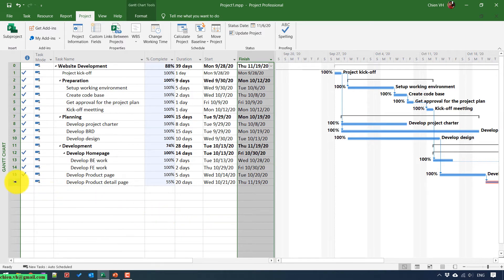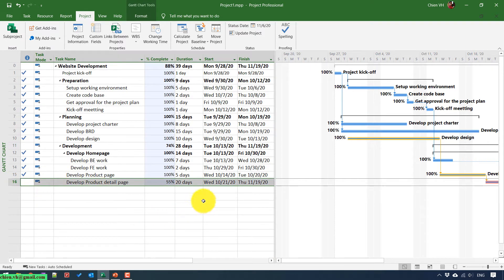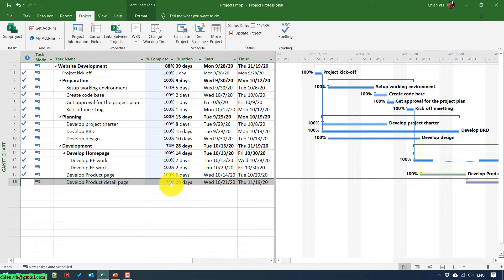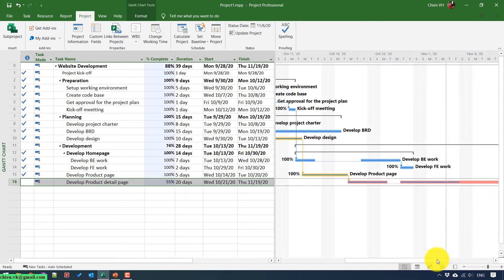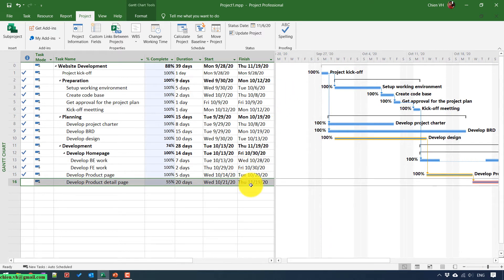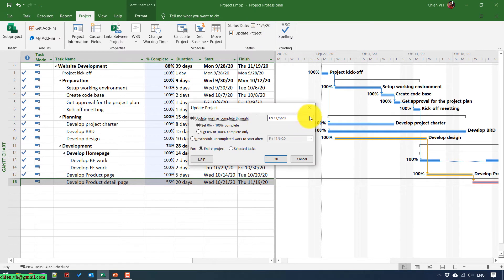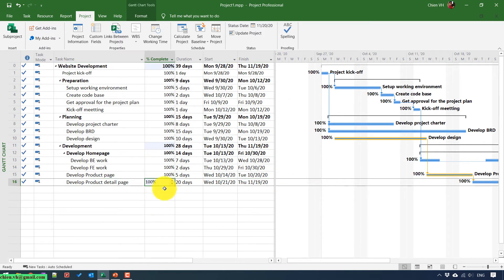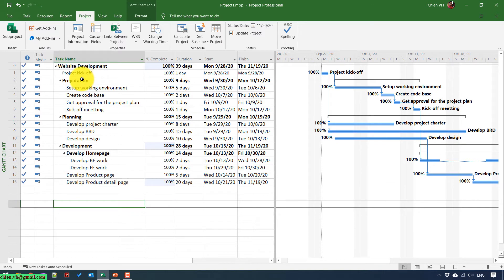For the last task, you can see it has a finish date of November 19th, which is greater than November 6th, so the percentage is only around 50%. If I update it by selecting a date greater than November 19th — for example, November 20th — this task will change to 100%. Let me show you. I select November 20th and this one changes to 100%. I will now go back to the first version.